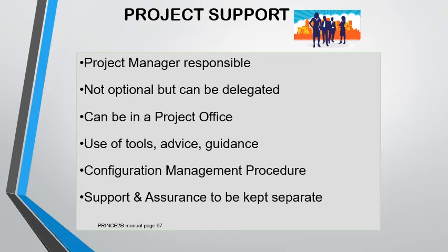Of course, they handle what we call the configuration management procedure, which is the system to make sure every item on the project is unique and easily identifiable. Now, as we mentioned earlier, the support role is independent of the assurance role. You cannot have one person doing the same thing. That cannot be combined.